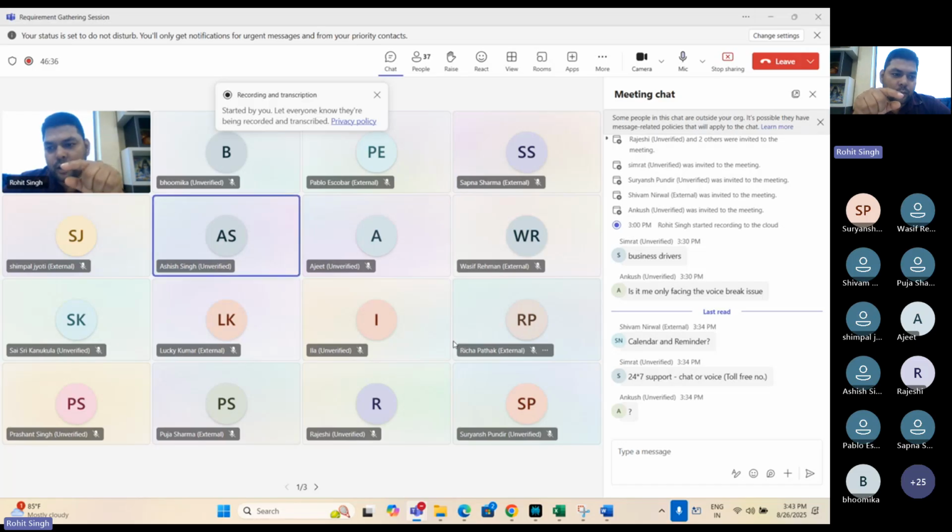As per the sprint backlog, we will start working on the sprint planning. As per the sprint planning, we will create the initial documents like FRD, user stories, use cases, test cases. And then according to these documents, we will create the agenda of the meeting for the requirement gathering. As per the requirement gathering, we will revise the documents and then we will start the sprint. And then we will end the sprint. And then again from the product backlog, we will create the sprint backlog. We will do the sprint planning, initial documents, requirement gathering, revised documents, grooming session, and then again sprint start and end.